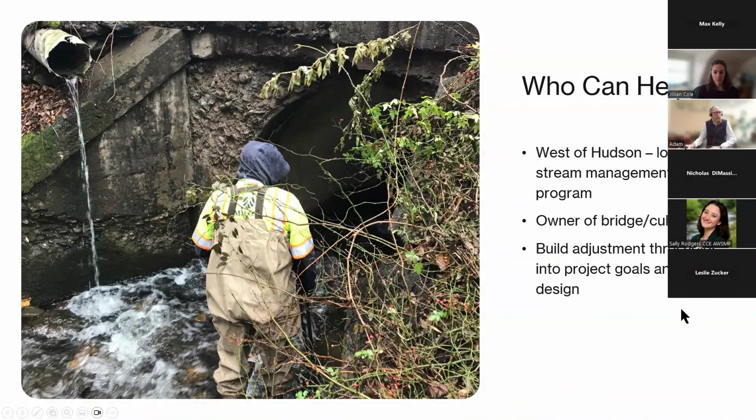And then one consideration to even think about when you're back in the design process is really building adjustment thresholds into the project goals and design. So that's creating metrics that, once met, might trigger a management intervention. And it can be useful to consider that at the start of the project versus after it's been constructed.